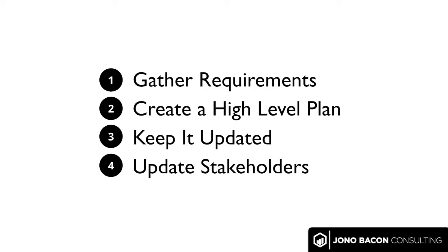The other thing that I would recommend as well is that you then on periodic times send a summary update of progress to the stakeholders. So when you say, these are the 15 things we're going to work on in this time period based upon your requirements gathering, you will periodically, once a month, let's say, send an email to all of those stakeholders and just say, here's a set of bullet points, giving an update on where these projects stand. And I found this to be a really lightweight, thin, effective approach to how you manage this kind of work and how you do it in a fairly transparent and open way.